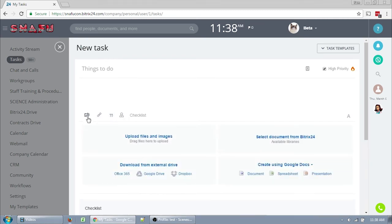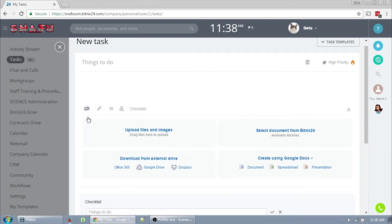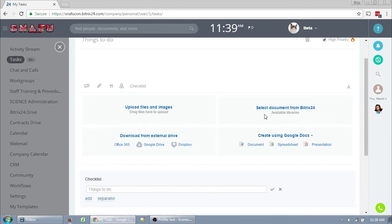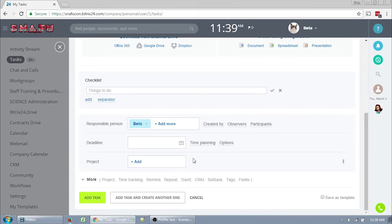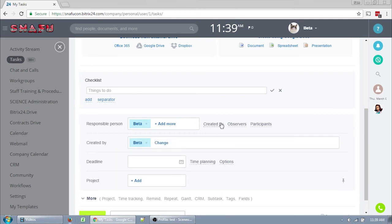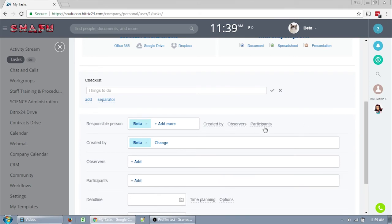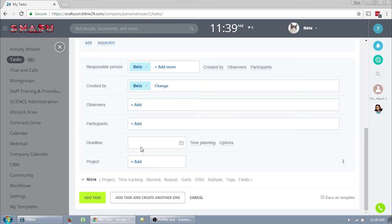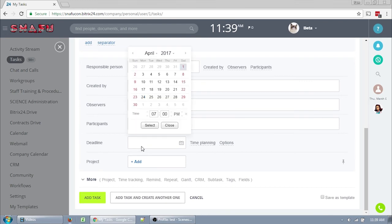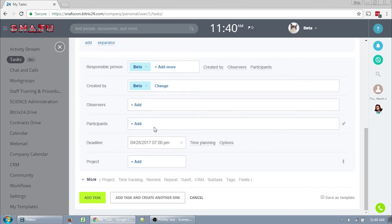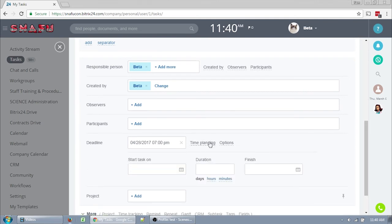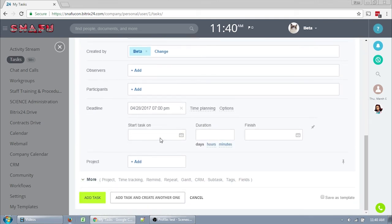Attaching a file to a task makes a little more sense than attaching it to a template. You still have the option to do it from Bitrix or from another service or upload it directly. The responsible person is the same. It works the same way. You can only have one responsible person. If you add two people here, it'll create two different tasks. Created by should be you. Observers are people who aren't likely to be doing anything on the task but want to keep up with what's going on. Participants are people who are likely to be doing something on the task. The deadline is a specific date for the task, unlike in the template where it gives you a certain amount of days. Now you can set an actual date that this task is due.